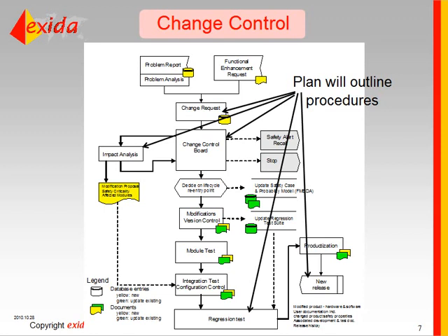And then once the impact analysis is done, the change control board essentially makes a decision again. Now they have a better understanding of how much work is required. Do they want to go forward and do it, or do they want to stop work at that point?